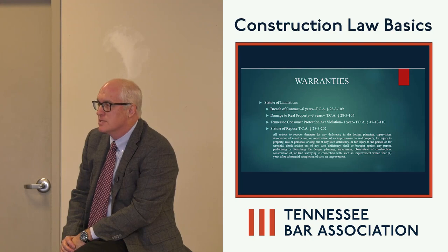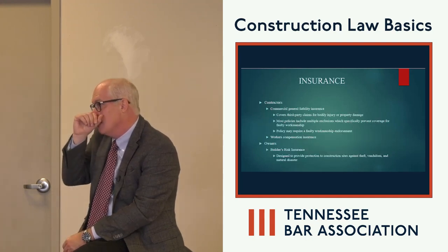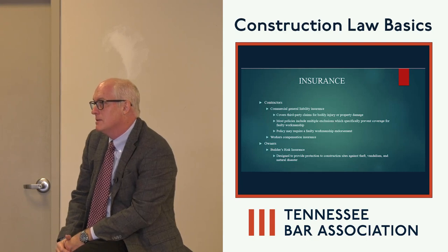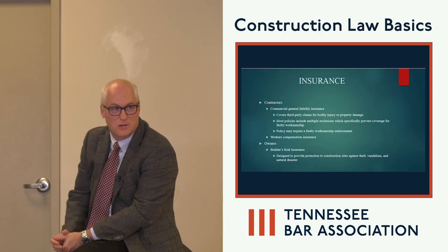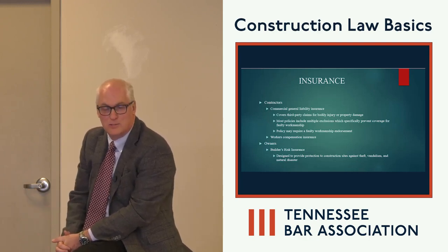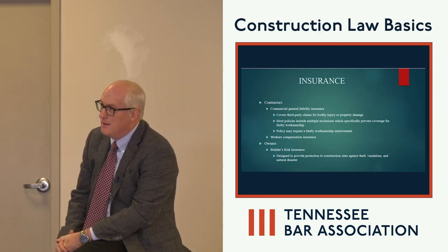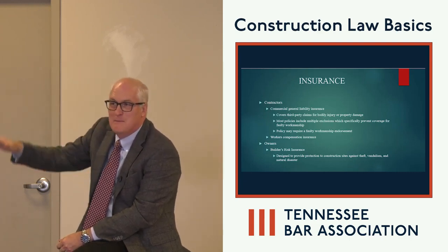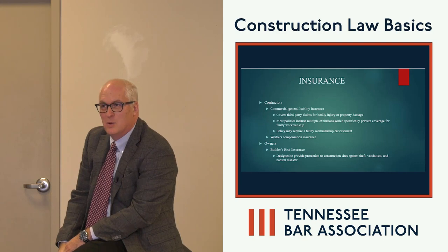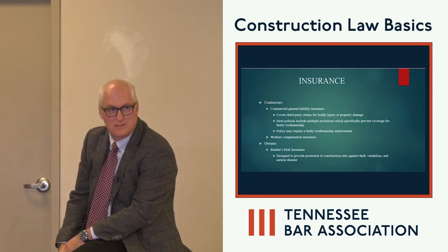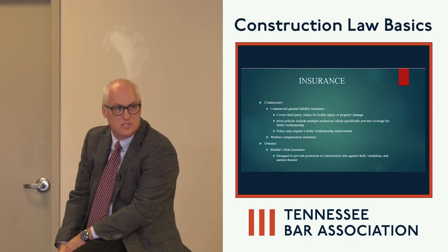Wow. Insurance, a lot of times you'll see insurance provisions. Contractors a lot of times will have CGL policies, to prevent third-party claims for bodily injury and property damage. I've run into this situation a lot, and I'm not an insurance lawyer, so it's always frustrating to me, but a lot of times when I think a contractor has a particular type of insurance, there's always some exclusion in the insurance policy. I was looking through some stuff for this presentation, and there's a ton of articles. I'm licensed in North Carolina as well, and I was reading some stuff over there about whether a construction defect is considered an occurrence under the CGL policy.